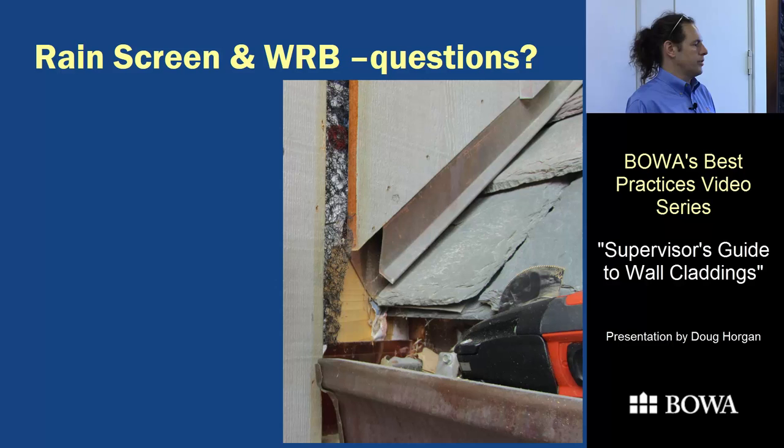Larry, just for your information, we propose that on projects at the very beginning. You usually get the project, and you get value engineered after the project a lot of times. Well, not the things that are standards. Well, I mean, for masonry, it's our standard to have a gap. And, right. For example, I prefer to have a rain screen for all my siding projects, but a lot of times if you're doing an addition to an existing house, to do a rain screen on 10% of the house doesn't really make sense. There's a lot of different conditions, but we just don't want to pay for it.